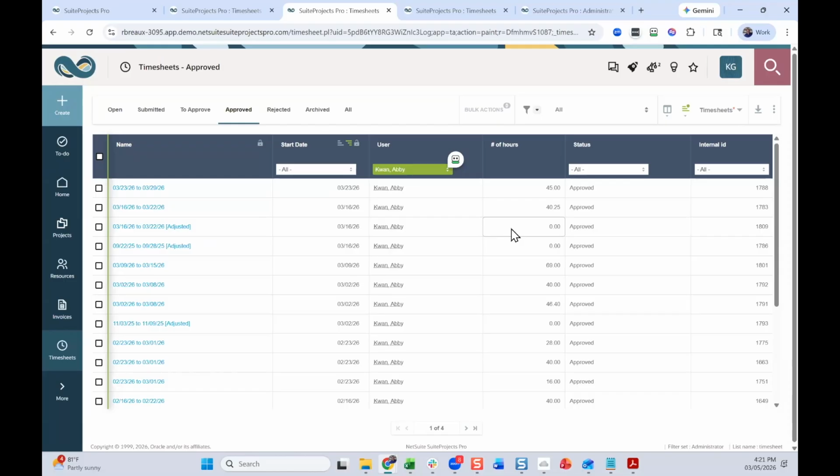against a project. Now, one last note, this is a one-by-one action. So one timesheet at a time, doing an adjustment, going to the next, which may be fine if it's a one-off. But we have some customers with thousands of users, thousands of resources putting time on projects. And occasionally they need to move time in bulk. And that is not something you want to go click through each timesheet and make adjusted timesheet. It would take you forever.